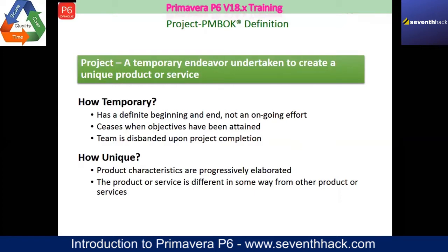Phase 2 would be doing the civil engineering work, maybe, then the mechanical engineering work, then electrical electronics, then the finishing touches, then the testing, and then the operation team training. So I will keep the rest of the project at the top level, and I will plan in detail the first level. Okay, so the product characteristics are progressively elaborated.